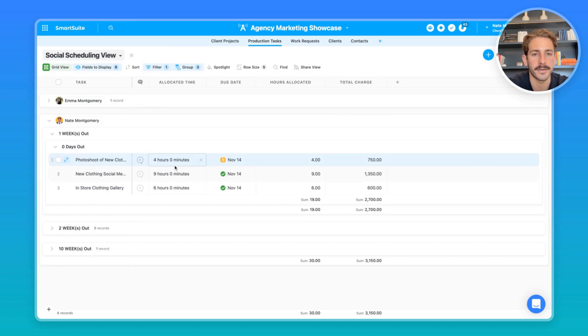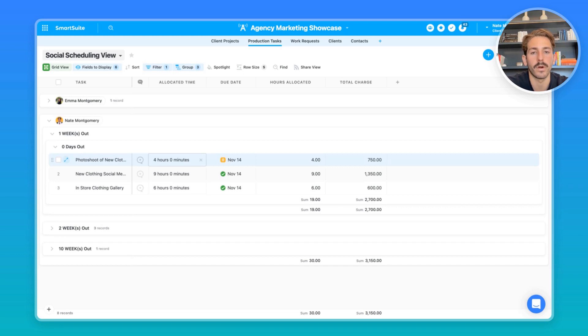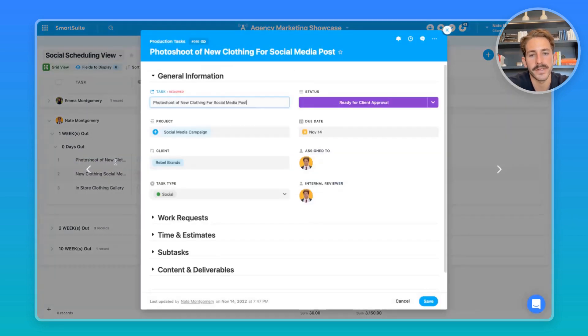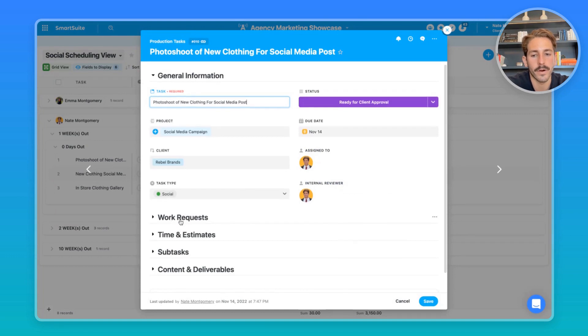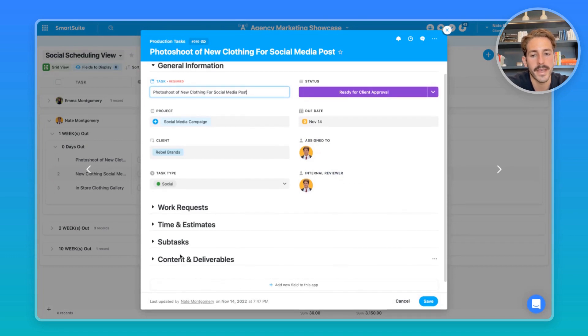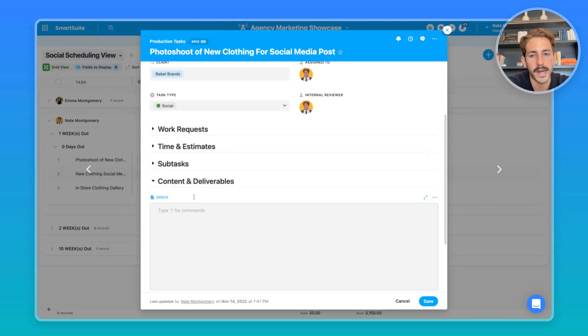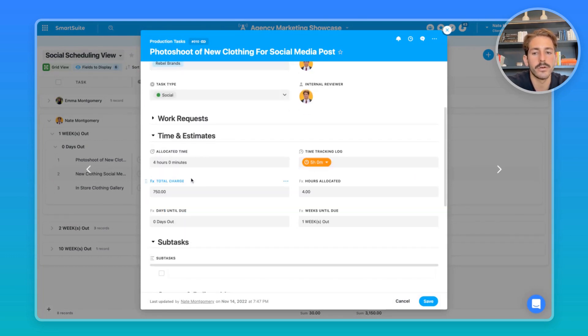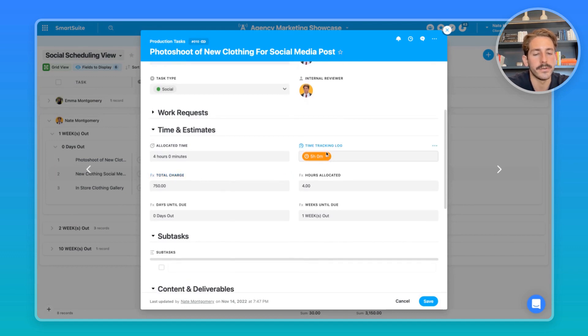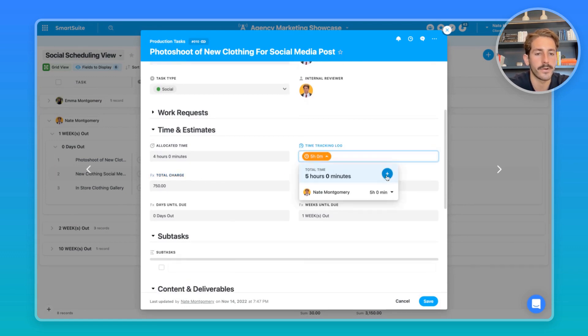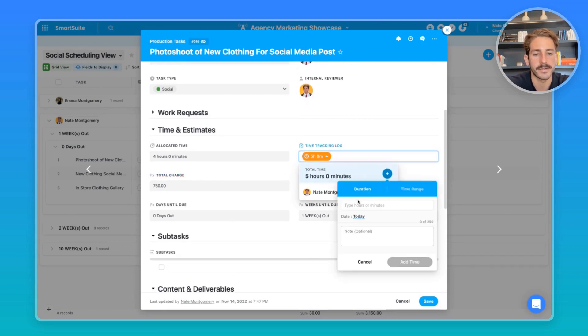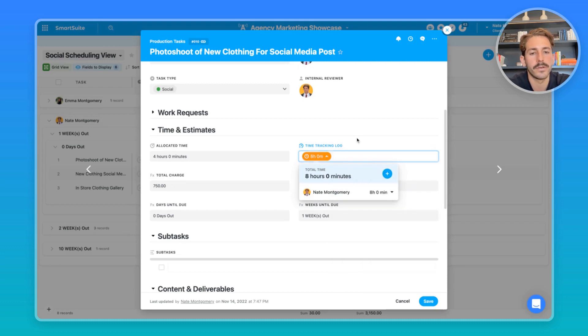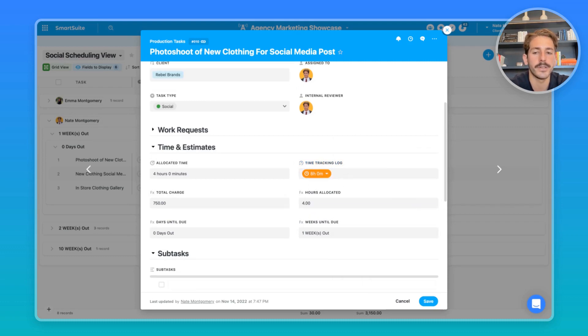So now that you've allocated all the time and it's a very balanced, manageable workload between your team, what they can do is do the work right inside of here. So inside of the tasks, as they're doing the work, they can put the content and deliverables inside of here, and you can also track the time right inside of this using the time tracking log. As they're doing work, they can add submissions, and this will count towards the time tracking total. You can see how much you're going to be charging the client based on the time and which task type it is.